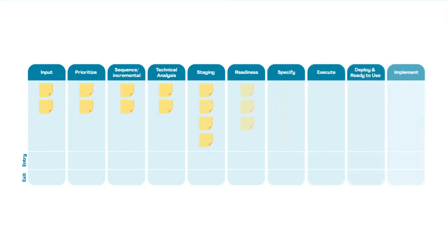On a Kanban board, each step is represented by a column. Work makes its way across the board, in this case, using sticky notes. To create a Kanban board, you need to start with a value stream or explicit workflow. In this case, we're using a simple process: ordering coffee.